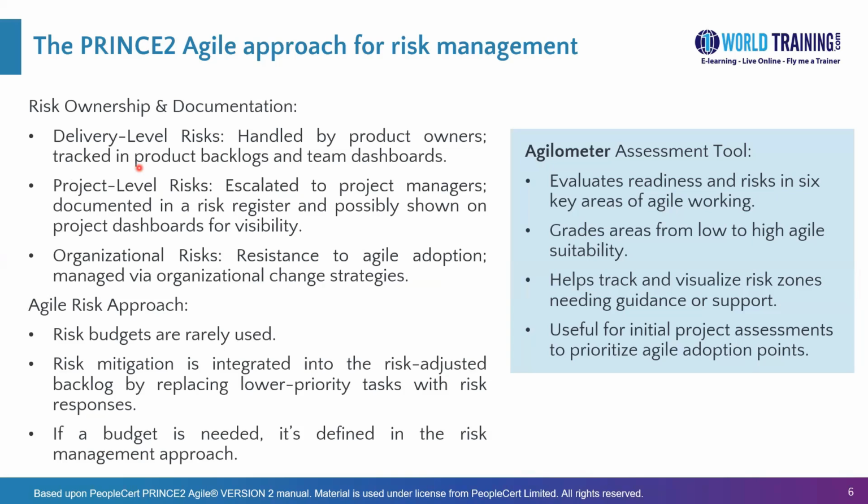It's known as a risk-adjusted product backlog, wherein not only the functionalities expected by the user or customer are there in the form of user stories, but also certain risk response entries will be there in the product backlog. Such a product backlog is called a risk-adjusted backlog.